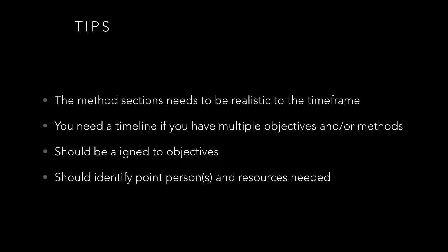For instance, I'm working on a grant right now with the Federal Aviation Administration, and what they're asking for is impossible to do in one fiscal year. And so what we did is we went back to the grantors, we went back to FAA, and asked them if we could do this in 3 phases over 3 years, and explained to them that what they wanted was impossible to do in 1 year.